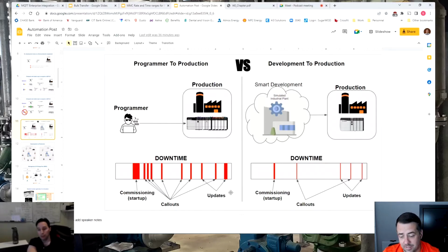That's until you show up on site, and all of a sudden the screen is not behaving the way it wants, or that they need it to. Yeah, the operator doesn't like it, or I don't like the color of it. This button should be over here. I want this logo there. I want pictures of this over here. Right. Okay, great. Put all those down, and once we're through with commissioning, we'll make those changes after it's all been approved.